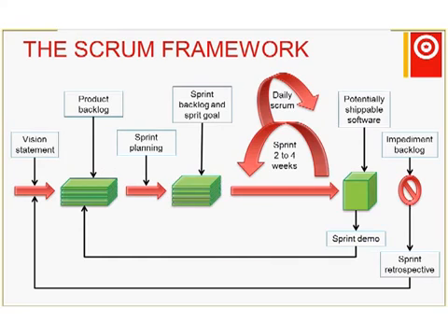So the Scrum framework, we have the product backlog, which initially is generated from the high-level requirements of our project. And then we plan a sprint. We plan to make part of that backlog into a potentially deliverable software. The sprint is 2 to 4 weeks of work. Normally a project will choose a sprint duration.